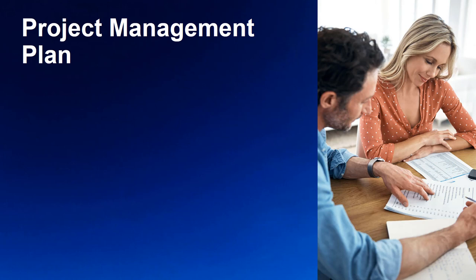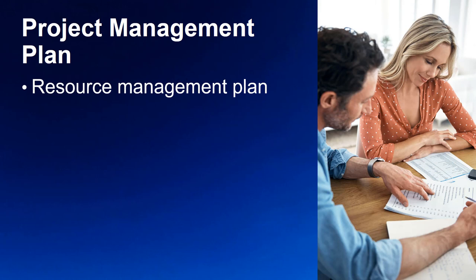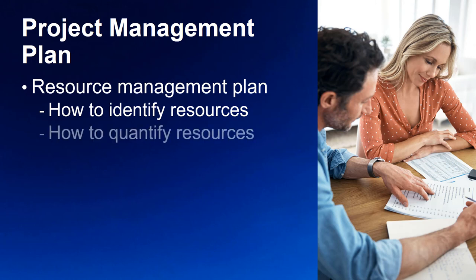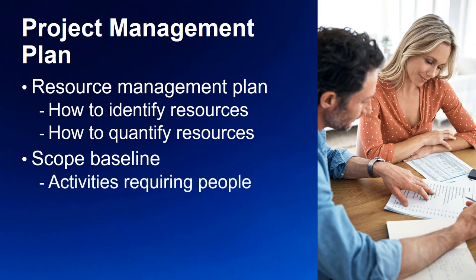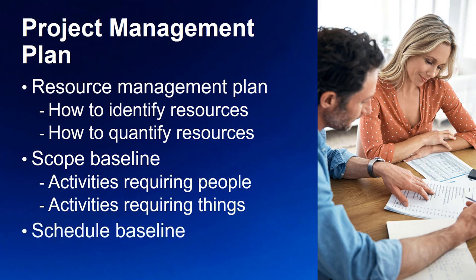Focus on those elements we know we need from the project management plan. First, the resource management plan shows us how we approach identifying all required resources and how they will be quantified. We need the scope baseline to see which activities need people, things, or perhaps both. And the schedule baseline answers the question 'when' — when an activity starts means that's also when a resource may be required.